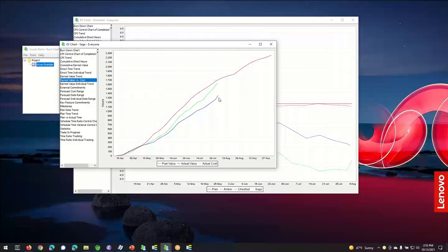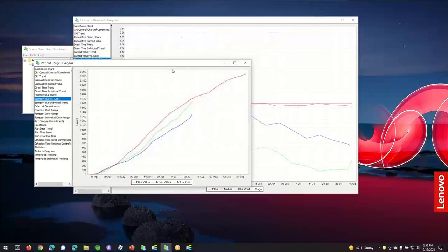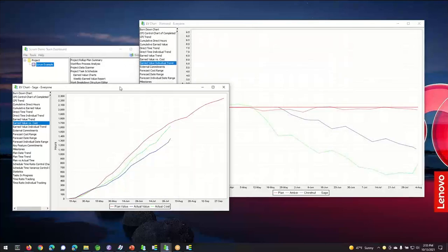But it gives them the opportunity to, for example, talk with their customer and say, all right, we need to take a look at the backlog and reduce scope and maybe identify some items that will get pushed off into the next program increment. They have the opportunity to do that, and they have the early warning that needs to happen. Most importantly, you can see both of these two teams were behind, but for totally different reasons. It's important to have the insight into the fact that those reasons were different for the two teams, so that they know the right corrective action to take.